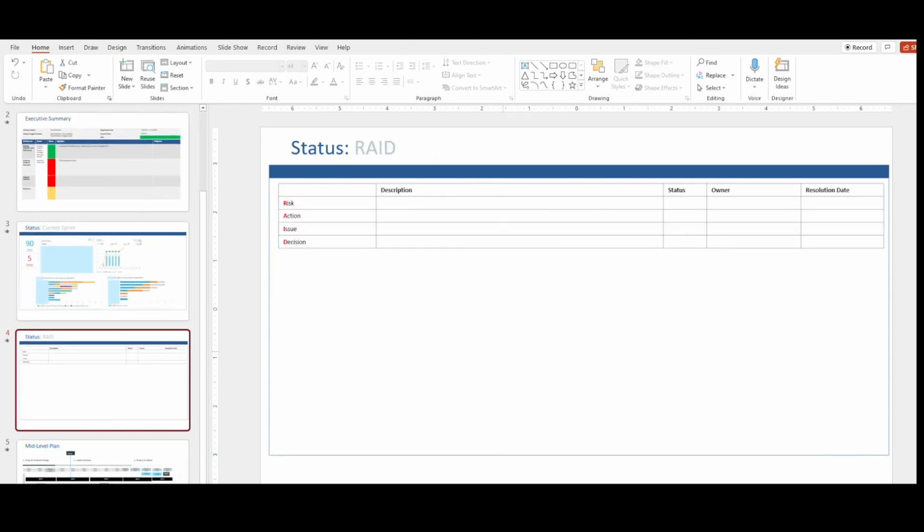All right, next up, pretty standard array-based log. This is a status readout of the risks, actions, issues, decisions. Usually not as neat as this. Tends to be multiple risks, multiple actions, depending on the size of the engagement. We love to report again a status of it. It's like in progress, blocked, etc. Really to show that the risks are moving through the actual engagement.